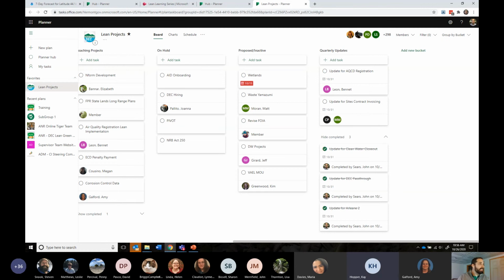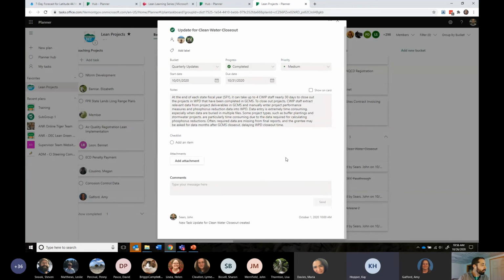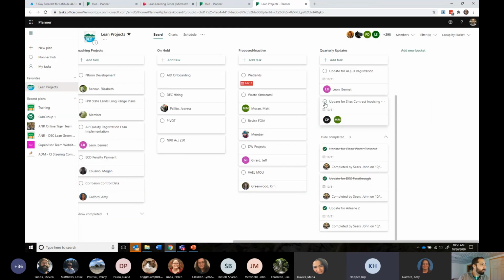Yeah, when you're setting completed manually on these tasks, you can tell it what day it was completed. Even if it's a week later, you can go back to the day it was completed. When you hit the completed part as a choice, it allows you to put the date that completion happened.